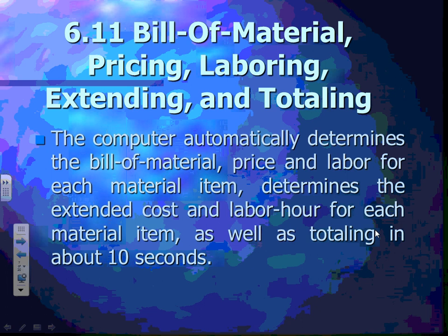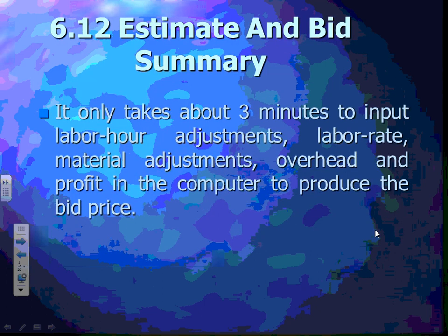So before you start doing the takeoff, Derek, you're going to put in the right tab, so you're under E6, for example, or E5, power, what not, and then pick the right assembly, if that's the assembly that you need, and then how many do you need, or the right conduits. Then bill of material, pricing, labor, and tooling, all these are done completely by the software. No gimmicks on that.